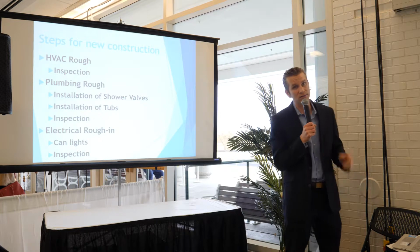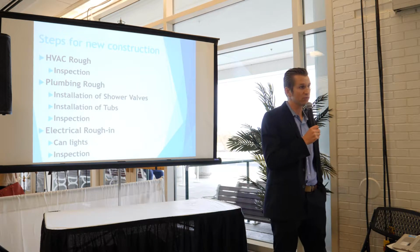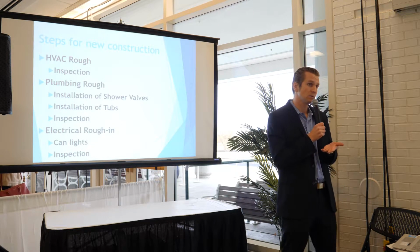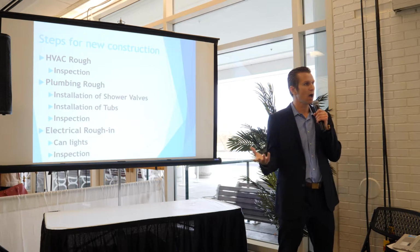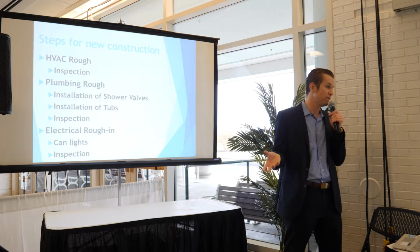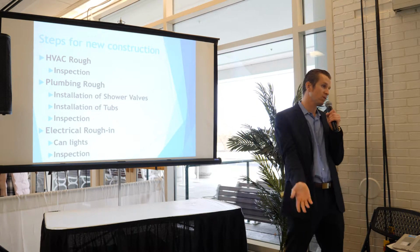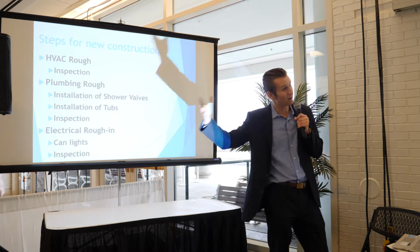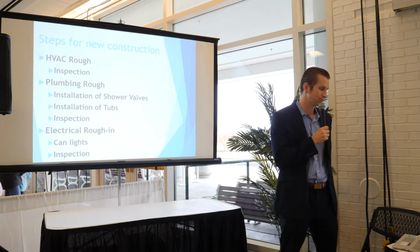You know, Illinois is pretty interesting. It costs a little bit more to build a home in Illinois than most other areas. Most other areas, they have PEX for plumbing, and PEX is a flexible material. Chicago is a very union town, that's why copper is required in most villages, and the city of Chicago, because we have a strong union presence. But when you're building with copper, that's more expensive, and actually PEX is a better product than copper plumbing. It's funny that they don't allow that in most areas.